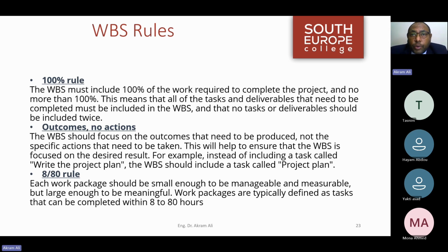So if I have a project that is small, it might not need detailed planning, or if I have a project that is familiar and it's not unique and it's similar to projects that we have done hundreds of times, so all risks are known and all estimates are clearly known, so I don't really need to go to such detailed level of work breakdown structure.